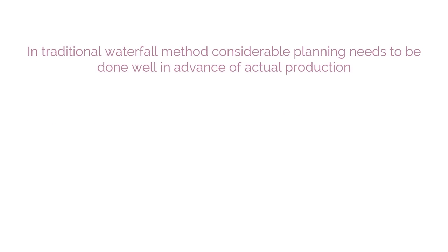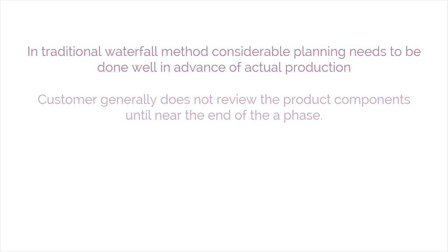With other methods, such as the traditional waterfall model, considerable planning needs to be done in advance of actual production. And the customer generally doesn't review product components until near the end of a phase or the end of the entire project. This method often presents huge risks to the project's success because the effect of each risk may be amplified through its impact on several developmental processes and thereby may have more potential for significantly impacting project delivery and